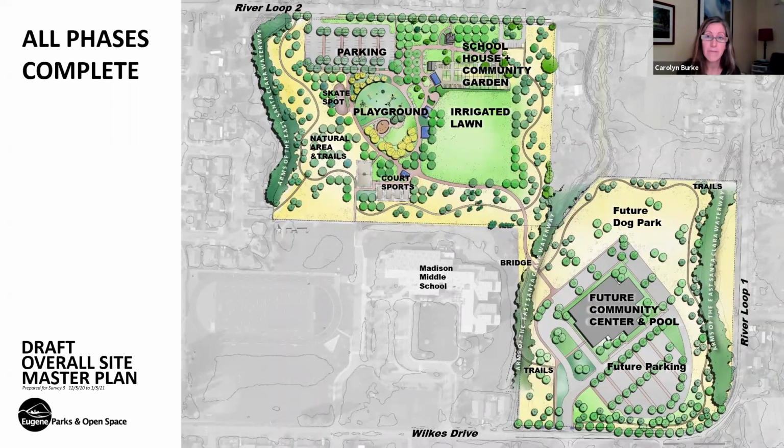However, we do need to get approval to annex the property. So right now we're outside of the city limits because we are newly incorporated into the urban growth boundary. So we do have an annexation proposal into the planning department, and I'm pretty sure that goes to both the Planning Commission and the City Council. So that's the one step where we do need that. But beyond that, as long as we are addressing our setbacks from adjoining properties and complying with all of our setbacks for natural resources and things like that, there shouldn't be any other processes related to land use. Okay. Thank you.